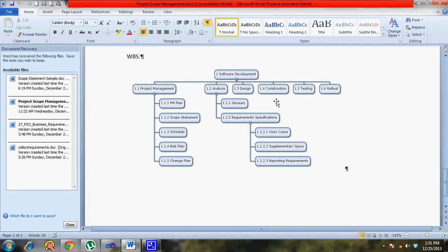Some parts of the WBS would not be broken down. This is because when you get to that particular phase, you'd get better details or a better view about what the components of that phase would be. So you would plan for that and do a breakdown at that point of time. Mostly the WBS has a better breakdown for the current work periods.